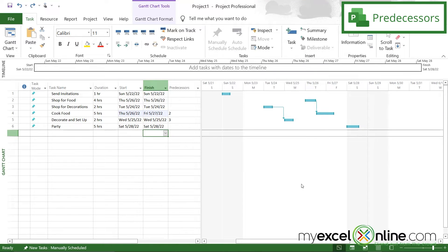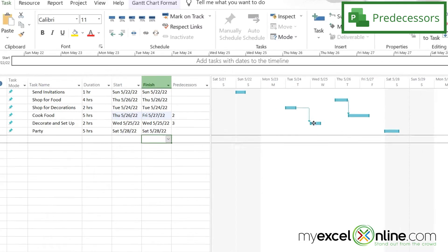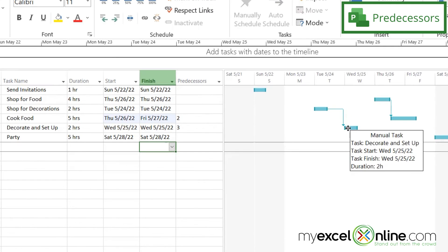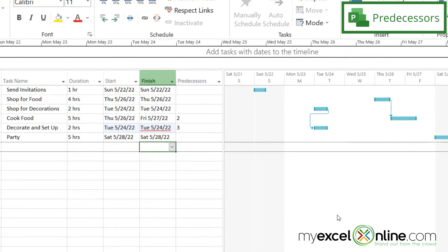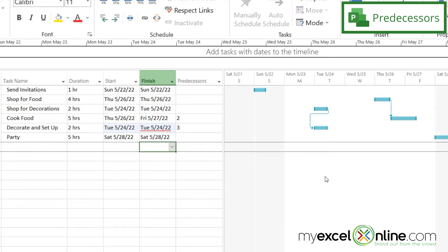So now let's see what will happen if I try to move a task before its predecessor. So let's take this one right here, decorate and setup. I'm going to click on that and drag to the left. So you can see that this box now has a dotted rectangle around it, and that dotted rectangle means that there's a conflict in my schedule because I can't start decorating before I have the decorations.